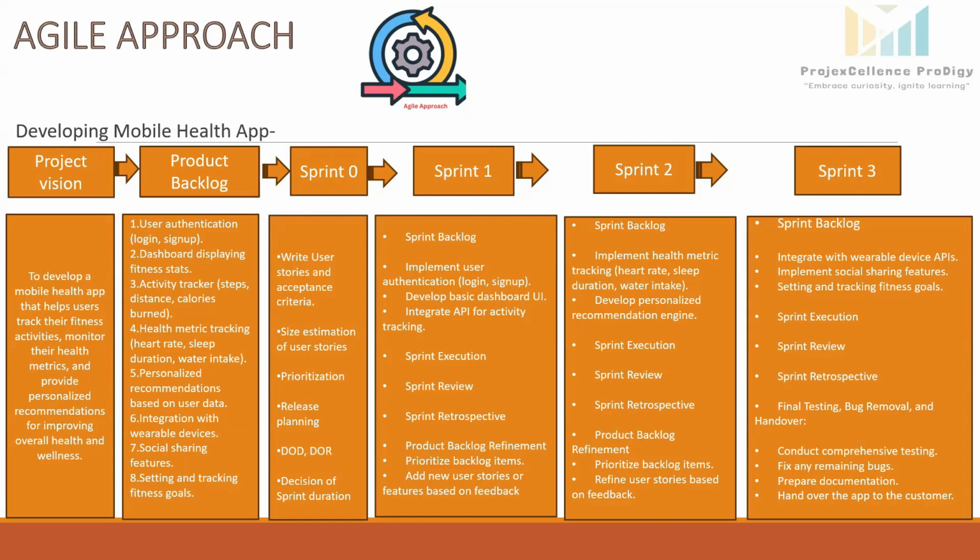Product owner's role is somewhat similar to the business analyst in predictive approach. And Scrum Master roles you can compare similar to project manager. He helps the development team to use the processes. He helps to remove the impediments and blockade. And project development team, normally there are 5 to 9 members, and each member is called as a developer.